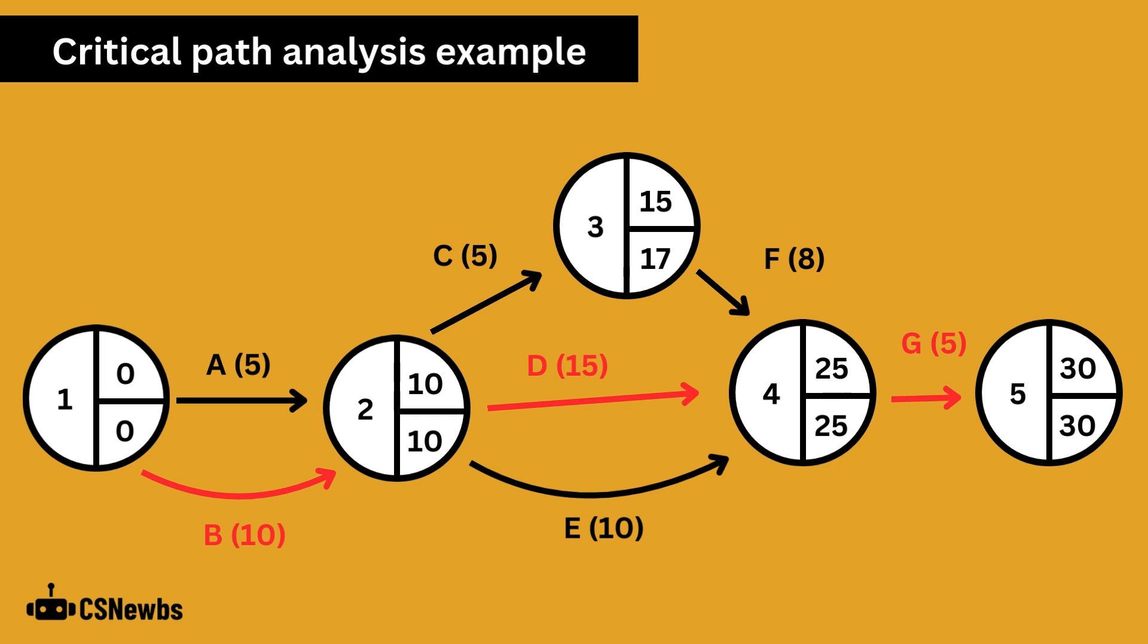To work out the critical path, we need the route with no slack each time. This identifies the key tasks which must not be delayed, or they will delay the whole project's estimated end time. So in this example, it is activity B, activity D, and activity G, which is the critical path.